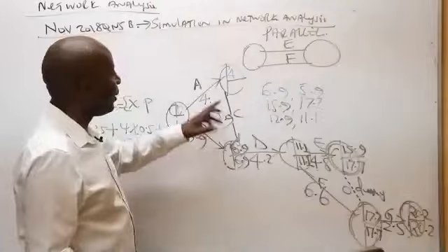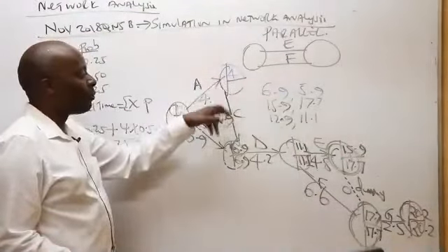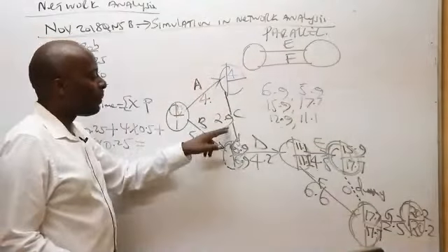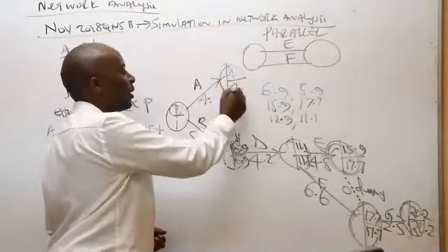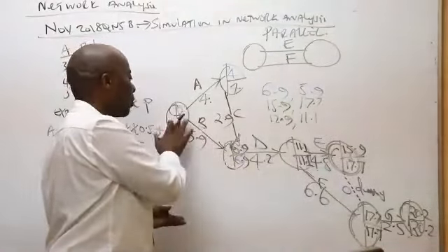Now from there, ladies and gentlemen, we are almost there. How about here? Here it's only one arrow going backward. So 6.9 minus 2.9, that gives me 4. And then lastly, we have this one, which is 4 minus 4, 0. Of course, 0 will prevail there.